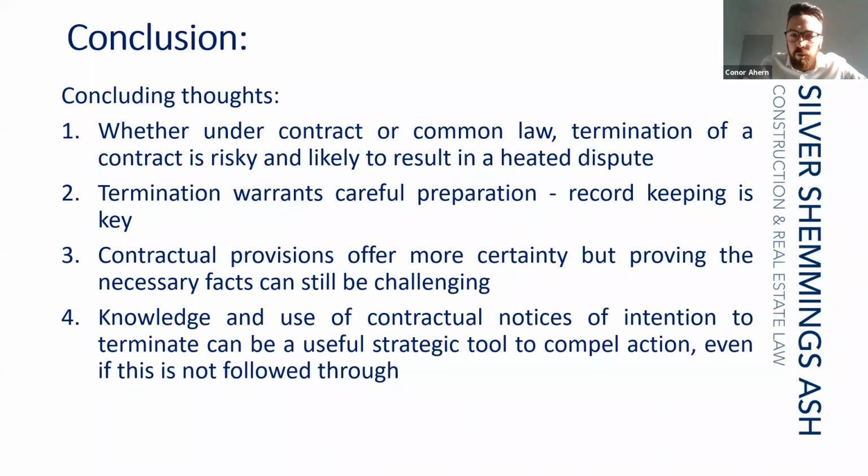Contractual provisions offer more certainty, but proving the necessary facts can still be challenging. Knowledge and use of contractual notices of intention to terminate can be a useful strategic tool to compel action, even if this is not followed through. So the default notice is a very effective way for employers to get their contractor to stand up and take notice of any defaults that are ongoing, because the cure period is only 14 days.